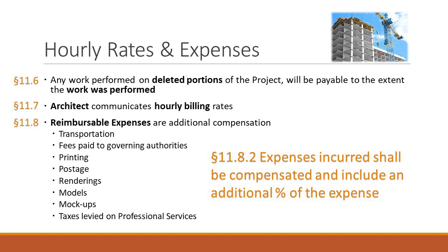Well, I've designed it, and it comes in at $1.1 million. Do I get paid on that? No, because we're not going to build it. It comes in too high, it's over budget. So now I have to redesign it. And it may bring down the cost of the work, but I've already worked on a portion of that. I should get paid for those services. So it should be payable to the extent the services are performed on those portions.